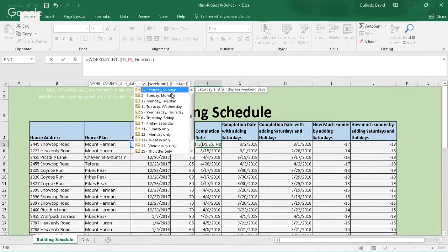Did you do it, Justin? Did you just do the workday function? I did, yeah. So you just chose what the workday meant. So I did workday, and then it asked for the start date, and then it asked for the days, and then you can do holidays. Oh, I guess I need to subtract out the holidays. Yeah, it didn't ask for that because holidays are there. Right. No, you're right. That's why I chose this one, because it had holidays in it.